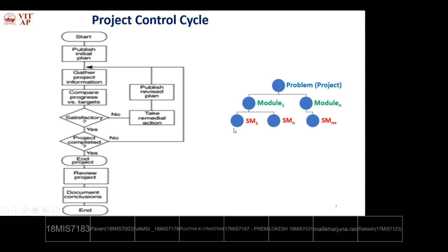So if it takes 7 days, what happens? The next module has to wait until this one finishes. If both are parallel activities, there is no problem. But if they are not parallel and one depends on this critical activity, it can only start whenever the other finishes. Actually 5 days are allotted to this task, but it takes 2 more days extra.